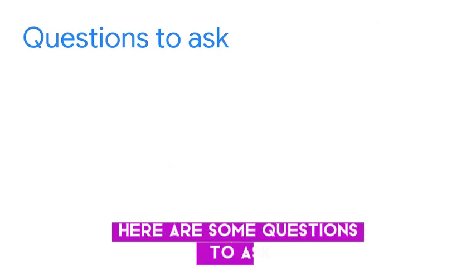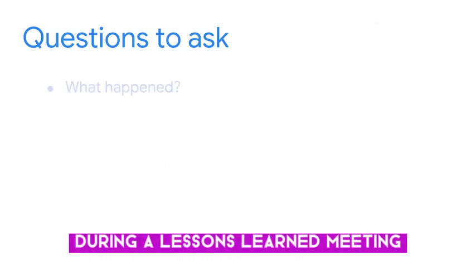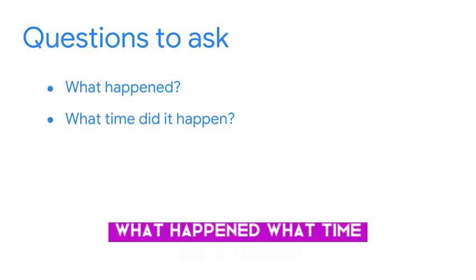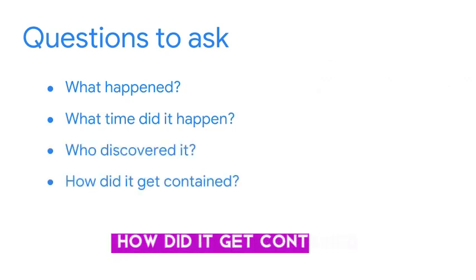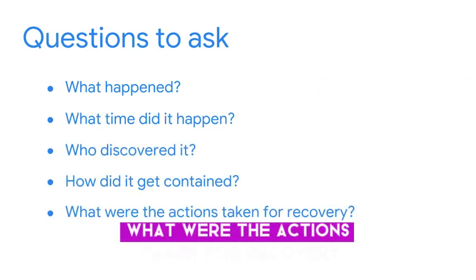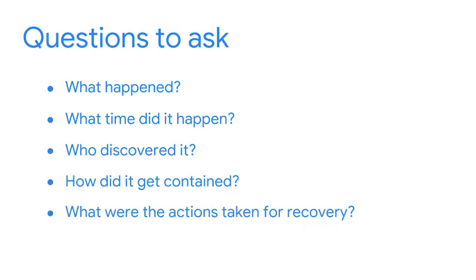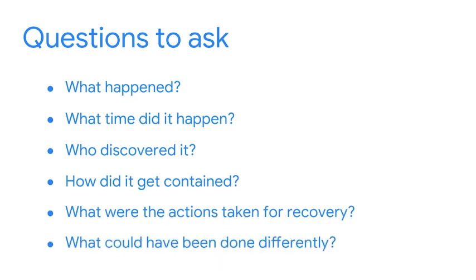Here are some questions to ask during a lessons learned meeting. What happened? What time did it happen? Who discovered it? How did it get contained? What were the actions taken for recovery? What could have been done differently?